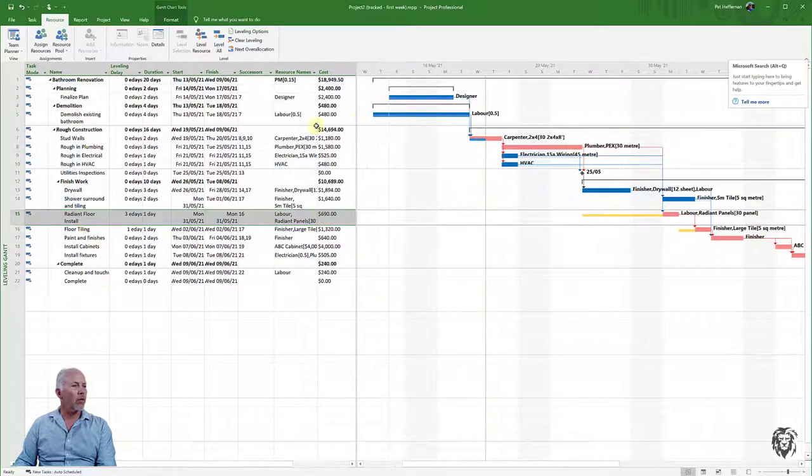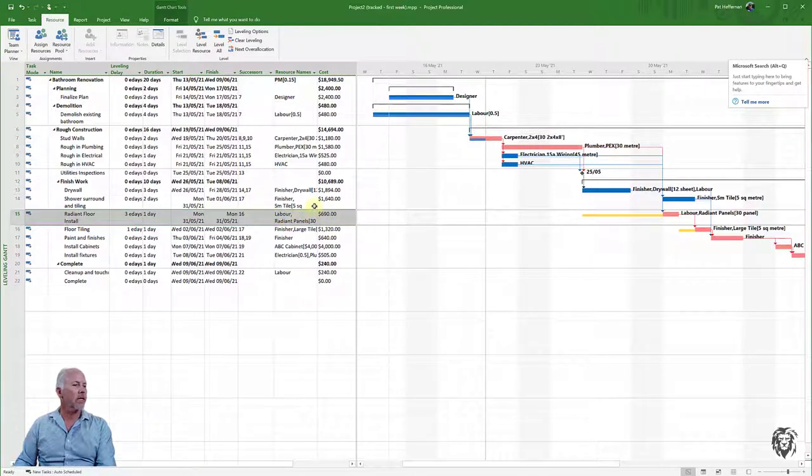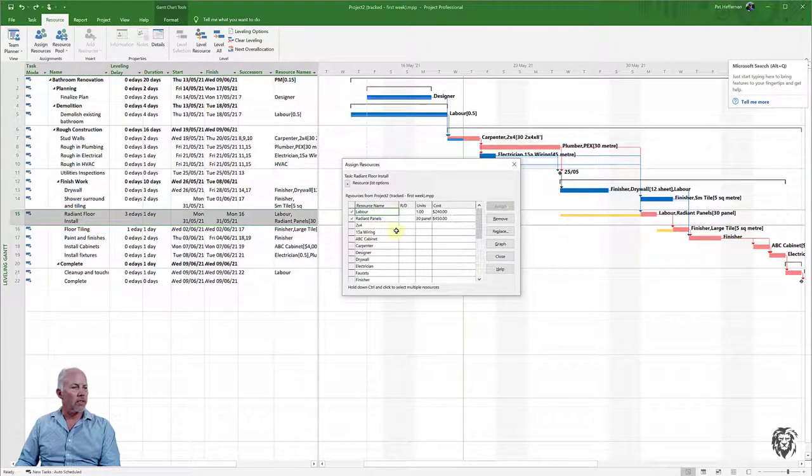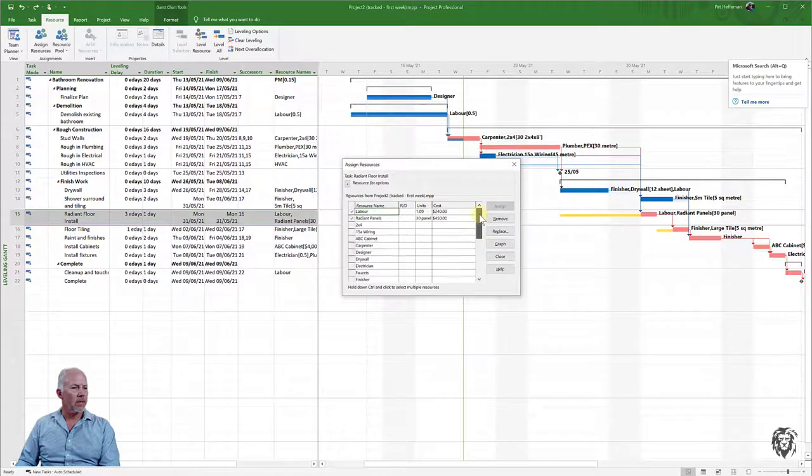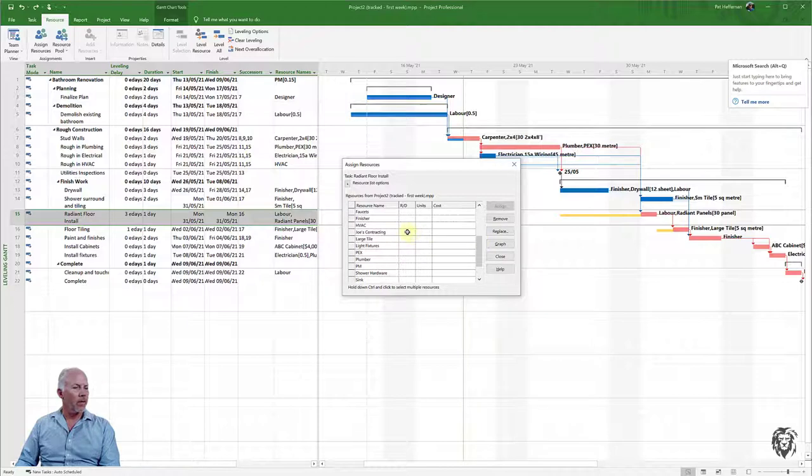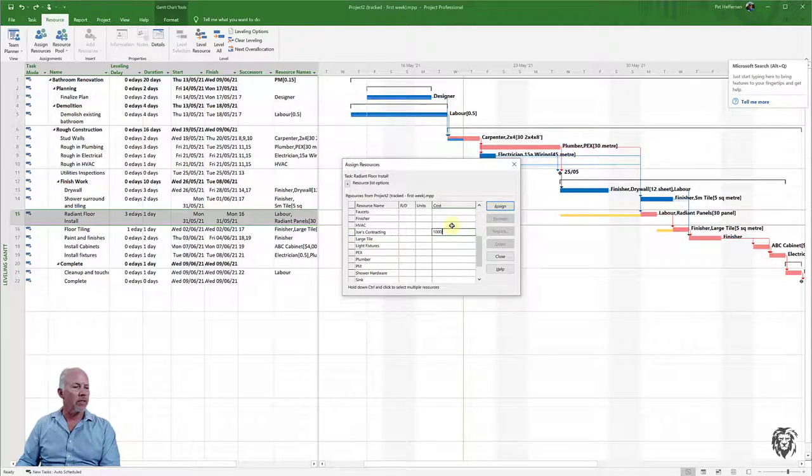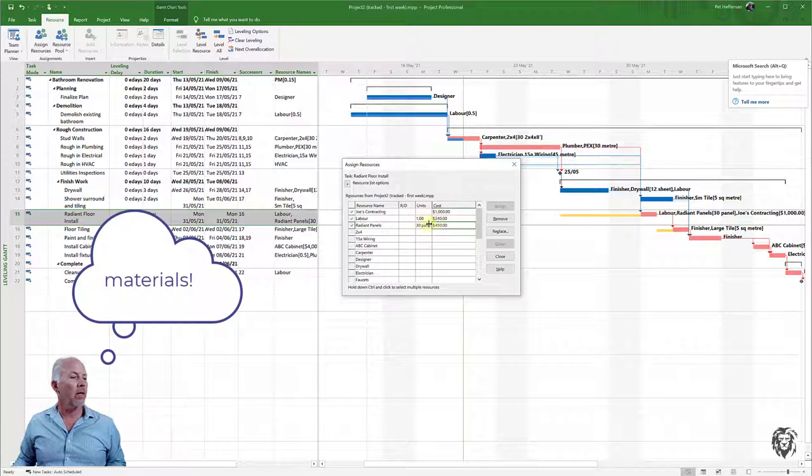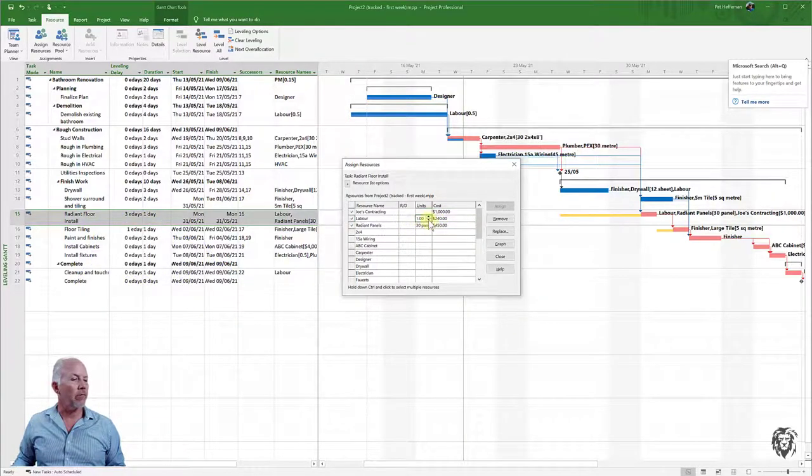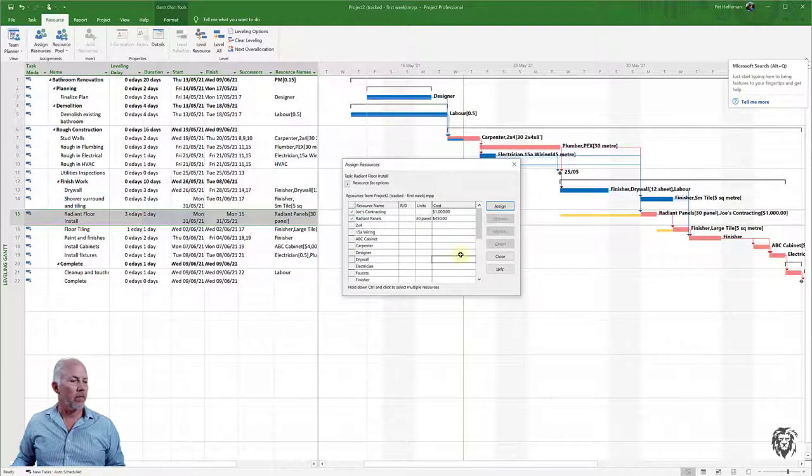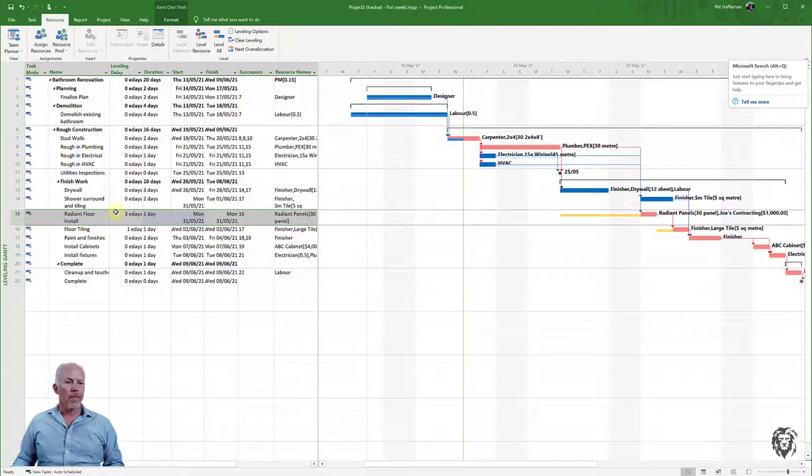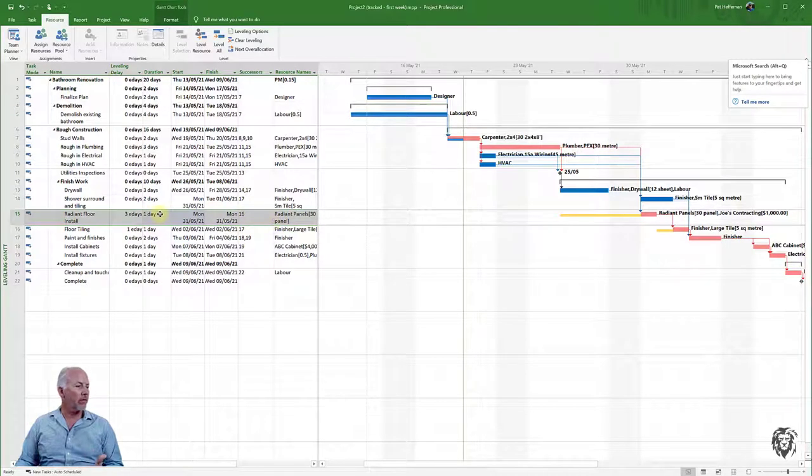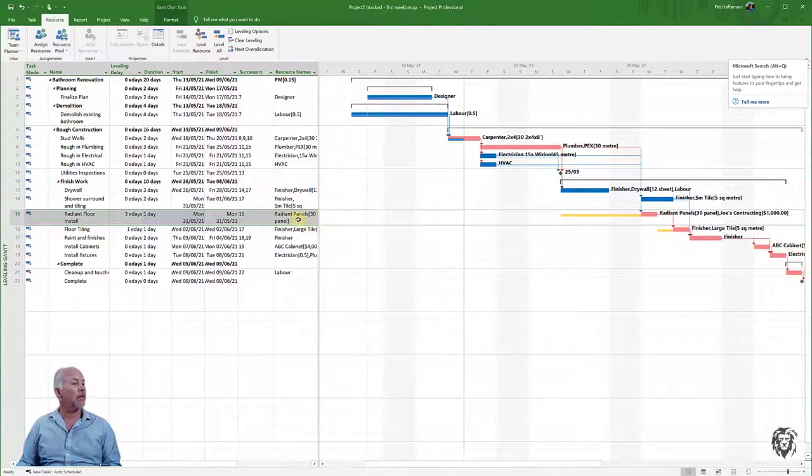Currently, the task has the laborer and panels as resources. We're going to replace that with a contractor. Looking at the cost column, it's currently costing $690 for the laborer and radiant panels. I'll go to Assign Resources and add Joe's Contracting. It's going to cost a thousand dollars for the install. We'll provide our own panels, so I'll remove the laborer resource and close.